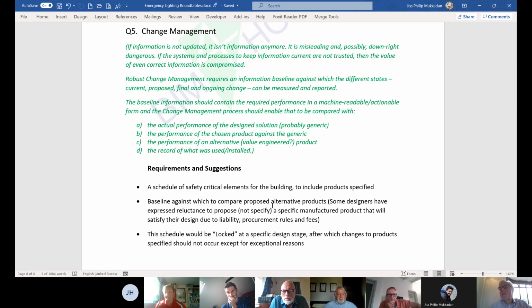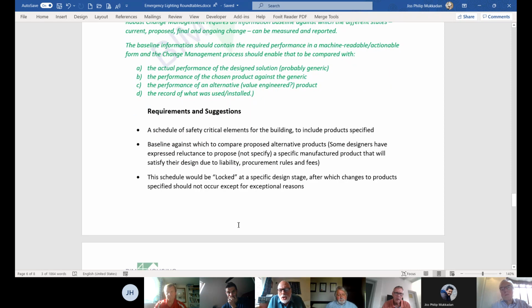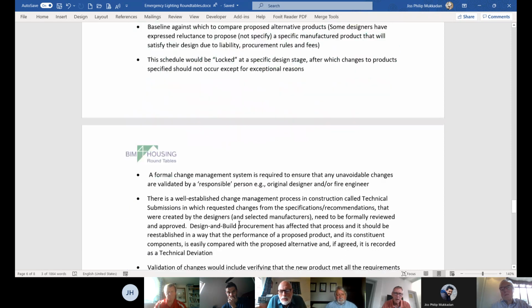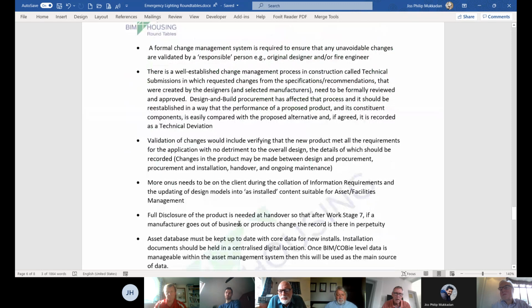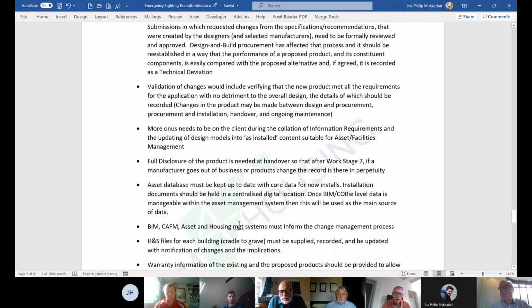Well, my experience with NBS is that it's woefully out of date. I hate to chuck that in, but it certainly is in my expertise. I agree. The requirement in 5266 is that evidence of the photometric performance has to be given as part of the completion documentation and handed over to the customer.